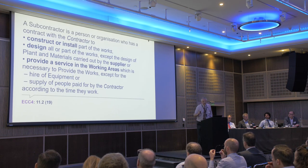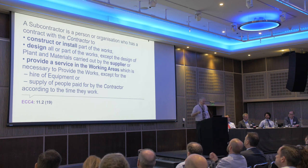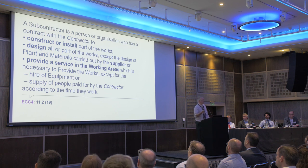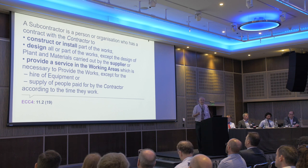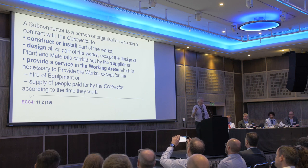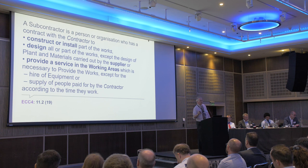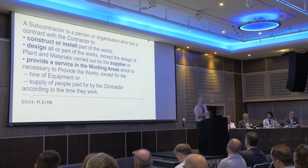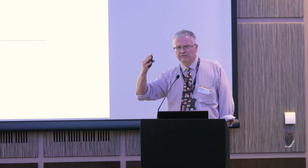NEC4 — ECC4 — has changed that quite substantially. 'Constructor installs' is still there. The supplier design, all or part of it, except the design of plant and materials carried out by the supplier. A supplier, in my interpretation, is basically somebody who isn't a subcontractor. But that does mean that if there's significant design being done by a tier-three party, does that mean the subcontractor is not a subcontractor anymore, because the design is being done by a supplier?